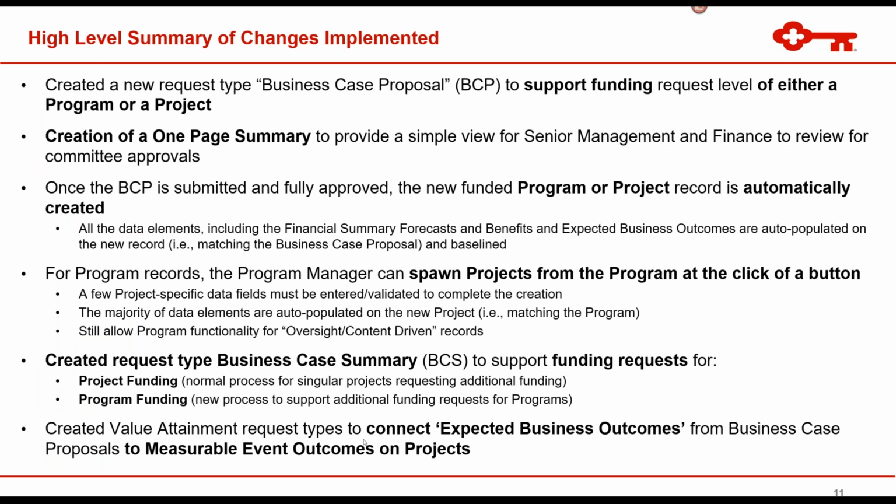So high level, what we implemented in PPM to address these issues was we created a new request type called business case proposal to support funding requests of either a program or a project. And it was modeled after the out-of-the-box proposal, but we created a separate request type for that.